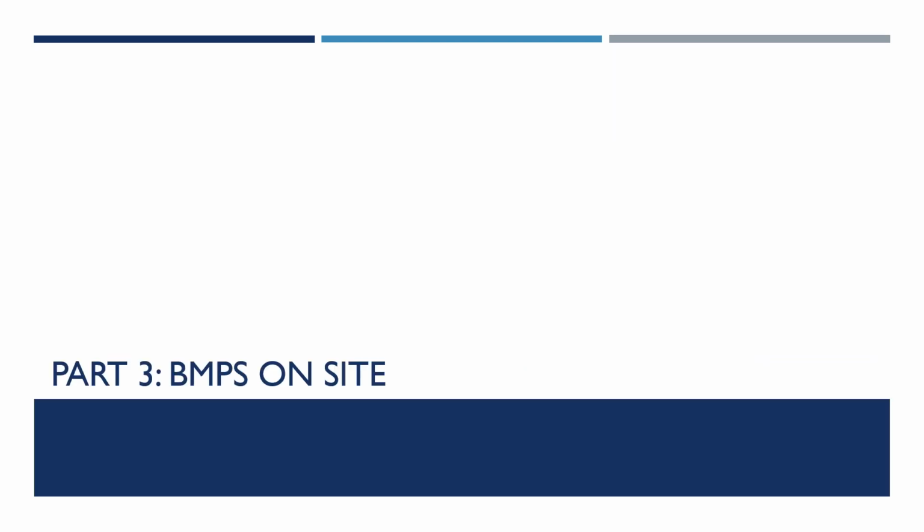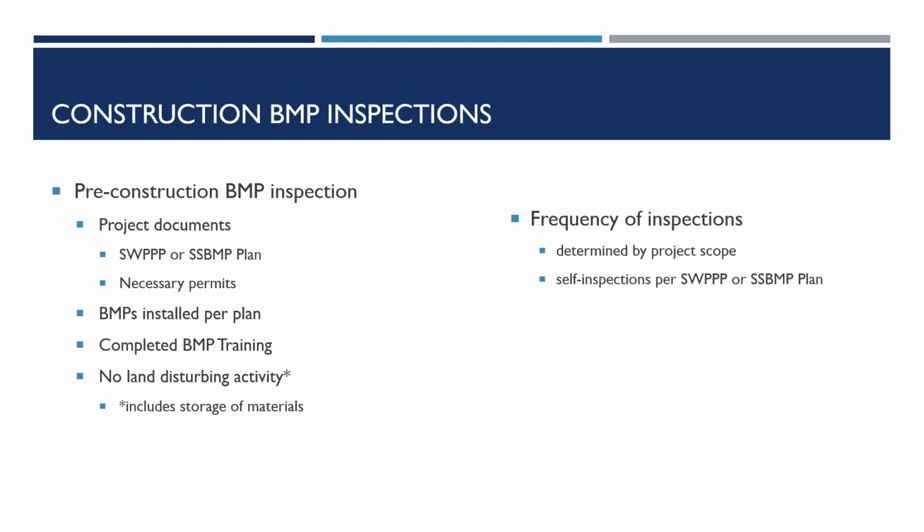Part 3. BMPs on site. Construction BMP inspections. DOT Airports conducts construction BMP inspections to verify compliance with DOT Airports environmental regulations. Before project work begins, and once BMPs are installed per the approved SWIP or SSBMP plan, a pre-construction BMP inspection will be conducted by AirEE BMP inspectors.